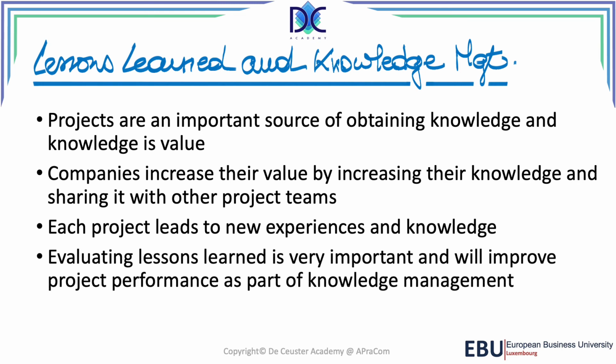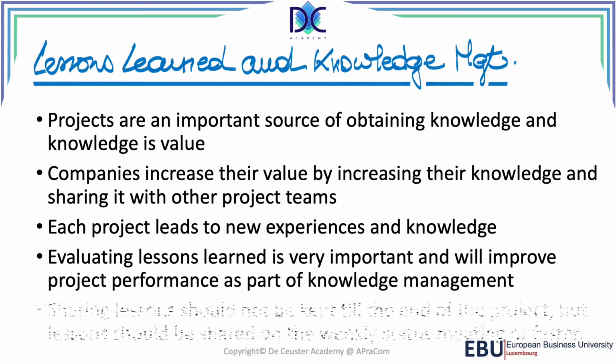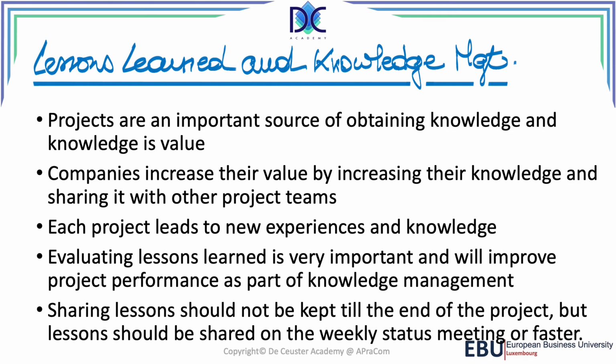Lessons learned is when we find some solution during the project, we find some ways to deal with it, and basically we can use that to improve project performance. And project performance can be shown, typically we say it's in closing, but we don't have to wait till we come to closing. We can do it before. So we have weekly meetings or bi-weekly meetings when we find out some new elements, some new items that we can use. We can share that already in the meetings, and immediately the people can use the information, can use the knowledge at that moment.